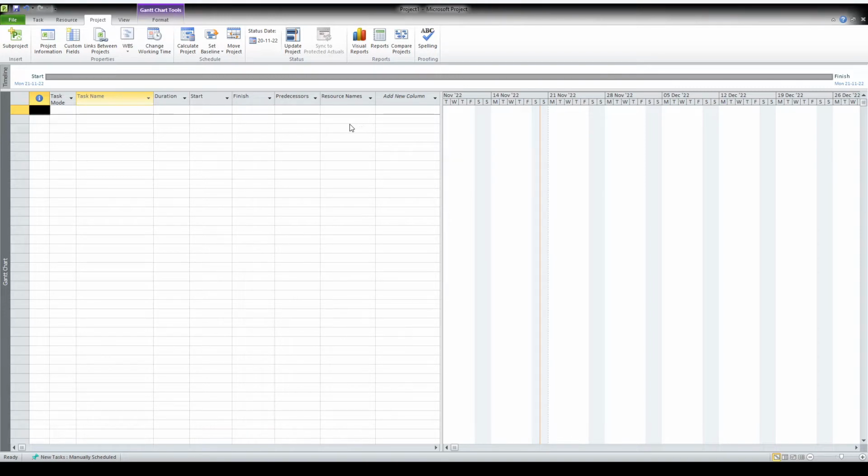I have given it as a house project calendar. You can give any name: Hill Valley, the name of the project, Apex Tex company name, any calendar you can assign. So what you have to do is create a new calendar, then click work weeks, then go into the details and set the days.